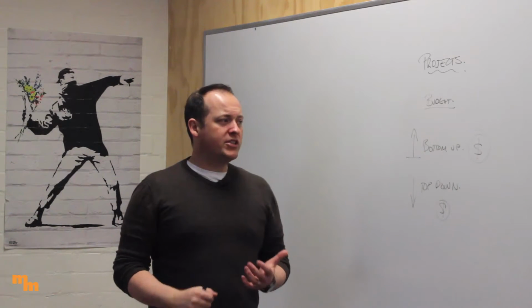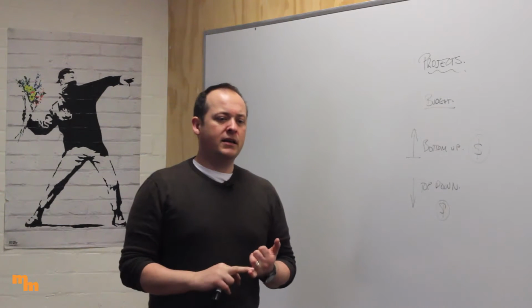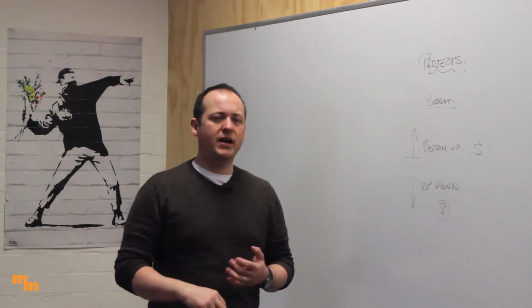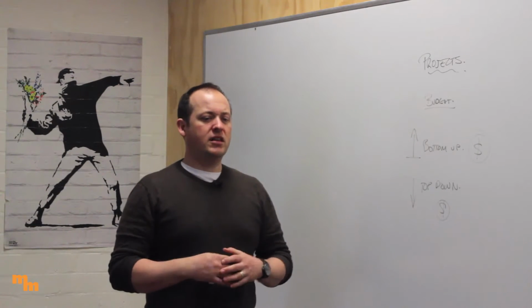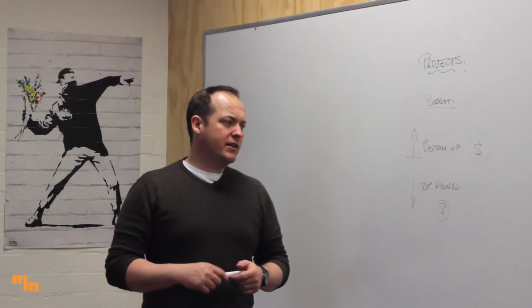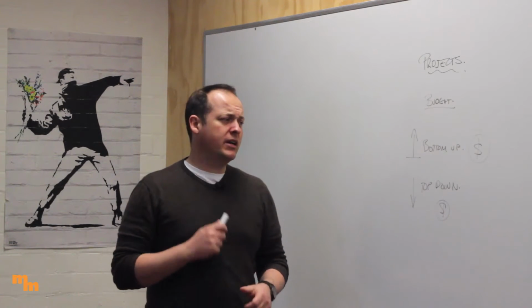Now, when I'm doing my budget, I need to make sure that it includes everything that has to go into the budget. I need to think about all my direct costs, my labor costs, my material costs, my hire costs, all those different costs. I need to think about capital costs. So if I need to buy any large items, I need to do that. You might need to buy vehicles, plant, equipment, machinery, large objects.